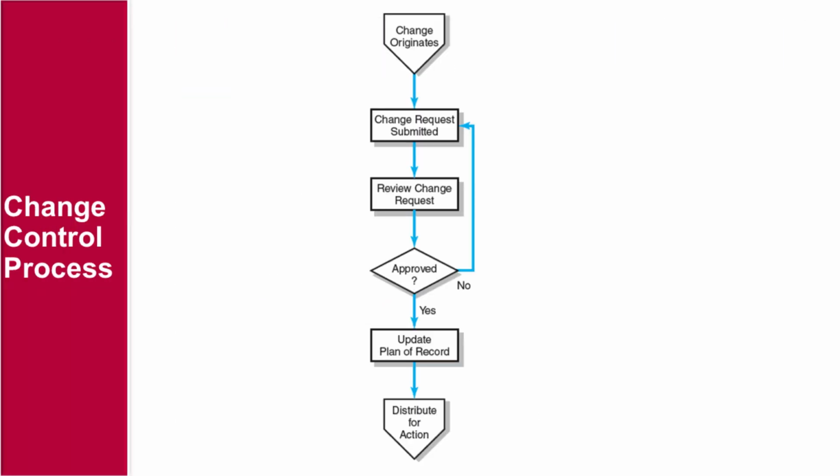As part of the project communication plan, stakeholders define the process for evaluating and accepting changes. This process can be illustrated in a flow diagram and varies by project size. For small projects, it may involve approval from a small group of stakeholders, while larger projects may have more complex decision-making processes. For instance, performance changes might require multiple approvals, including from the project sponsor and client, while supplier changes might only need the project manager's authorization. The aim is to establish a clear and efficient process for managing necessary project changes.